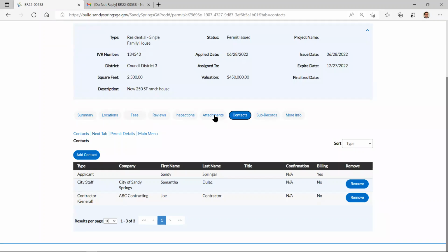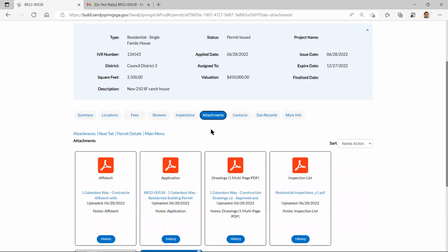Because if it's a commercial project, you don't own the property, so you need permission from the owner. There's an owner's authorization, which says, I allow them to do this work on my property. And then you have your general contractor's affidavit, which is basically here's all my license information and I'm working on this property. Same thing for the trades, the subcontractor affidavit. So, good questions.